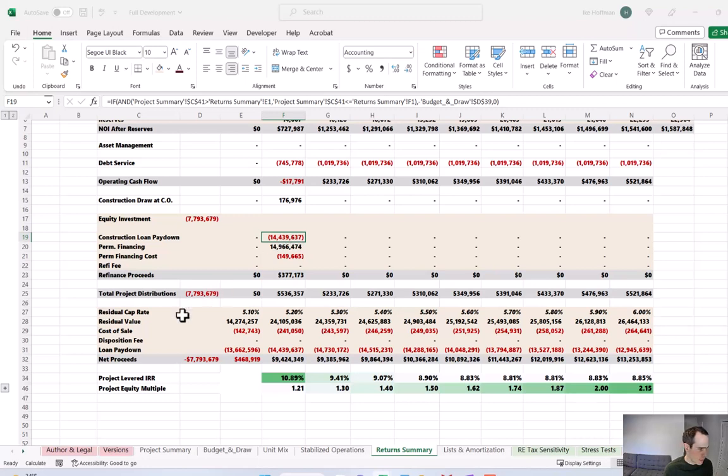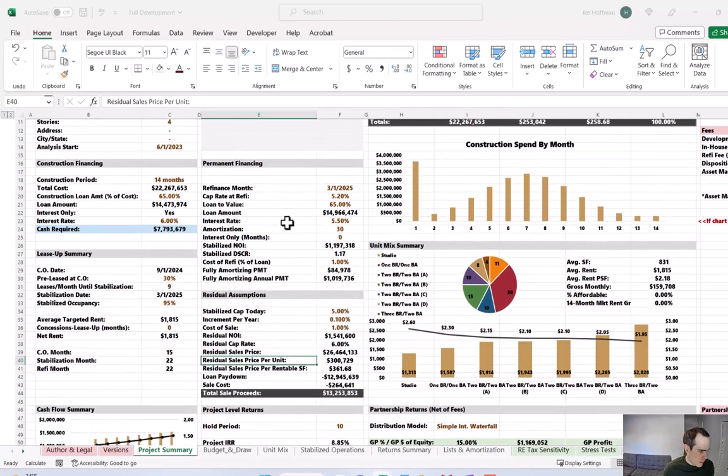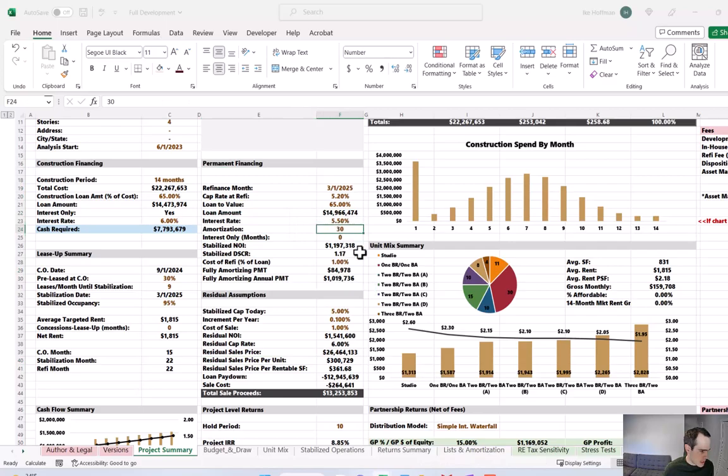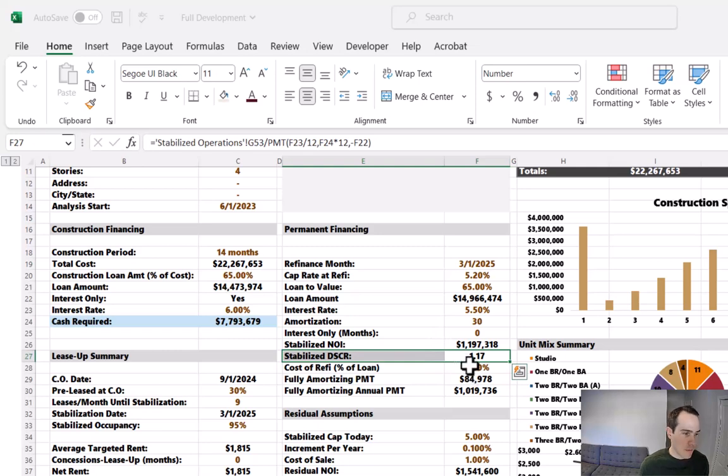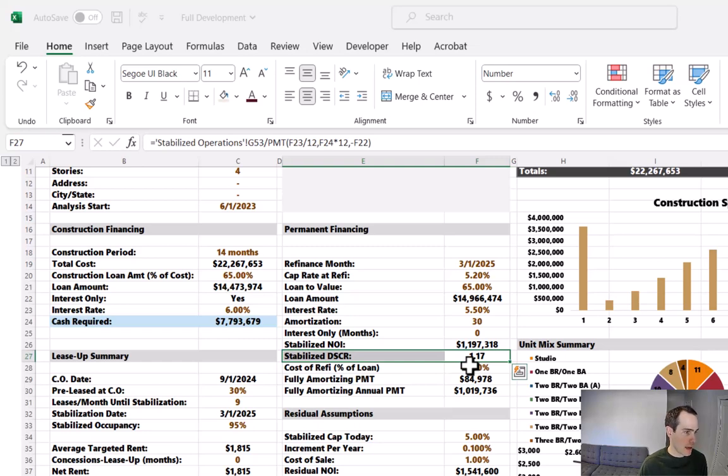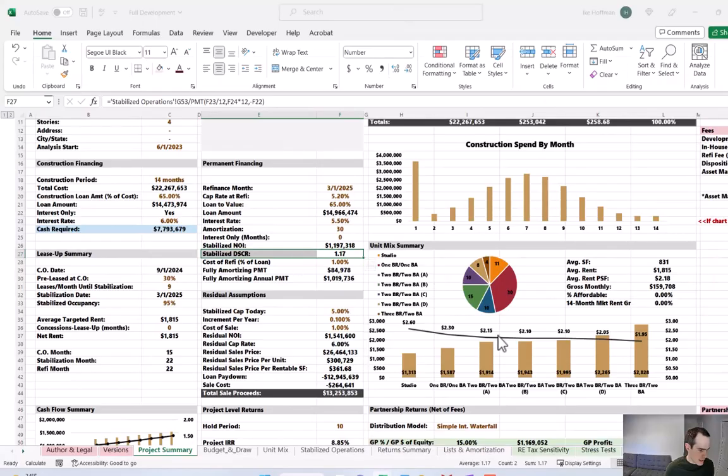The other thing that I don't love, we talked about the IRRs being too low already. If we come to the permanent financing section on the project summary tab, that stabilized DSCR we have isn't even 1.2. A lot of lenders will sign off on 1.15. I've even seen some go as low as 1.1, but ideally you would want to see this higher on this initial underwriting run to give yourself some cushion because the last thing you want is to be stuck in that construction financing, especially if it's floating rate. And then let's look at the return on cost.